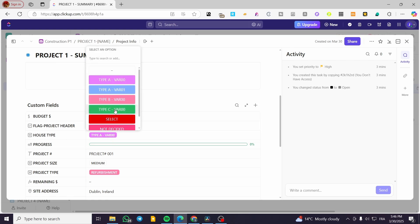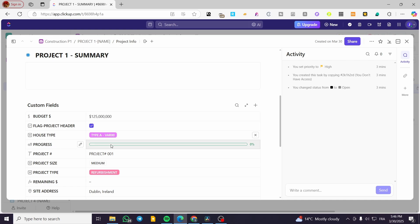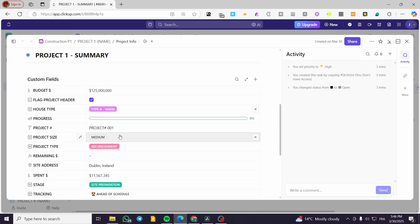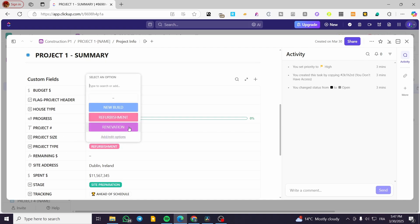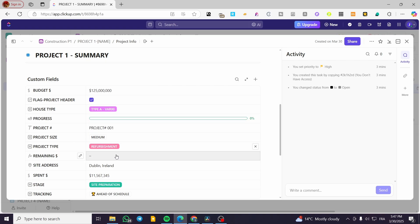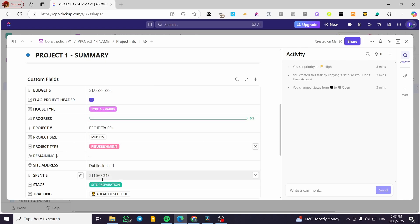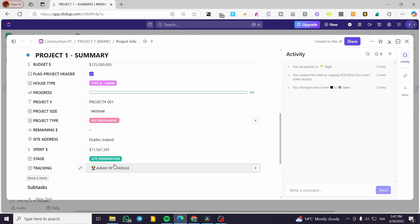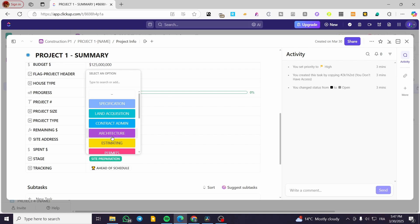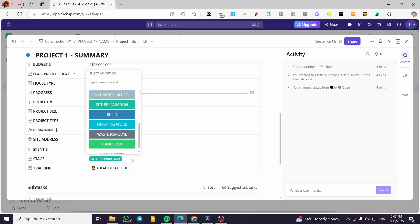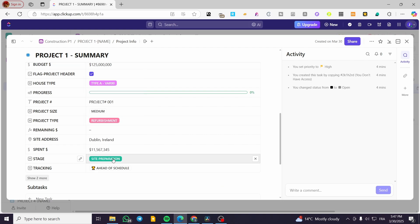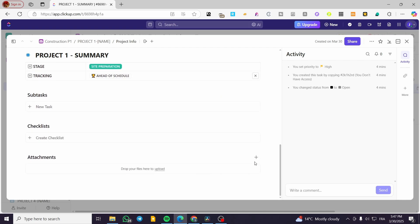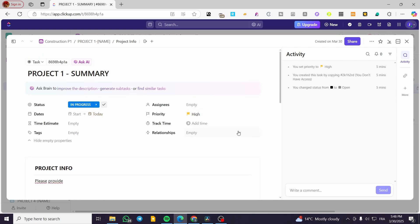You're going to have variations of house types. We also have a progress bar, project number, project size, and type — such as refurbishment, renovation, or new build. There's remaining money, advance amount, spend, and address fields. The stage field includes options like site preparation, estimating, architecture, and more. These are going to be very useful. You can also add tracking, subtasks, checklists, and attachments such as photos or Google Docs for invoices.